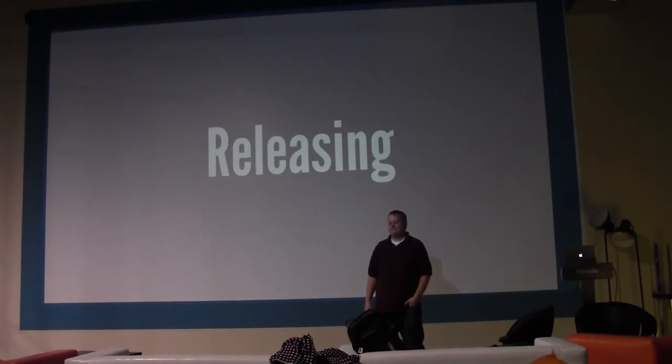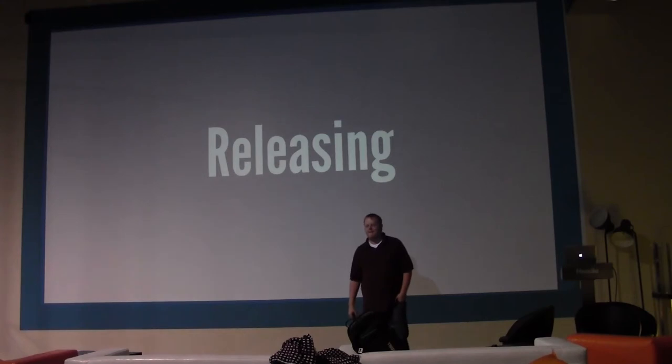You also have teams you can't compare. So you don't want your executives coming down and saying, gee, how come you guys did a sprint that's worth 100 and this one's worth 20? It's all relative. Yeah. And so by doing that, you actually almost shield yourself a little bit in terms of effort. Yeah. Because a 2 for my 4 developer guy is not the same as a 2 for my junior.